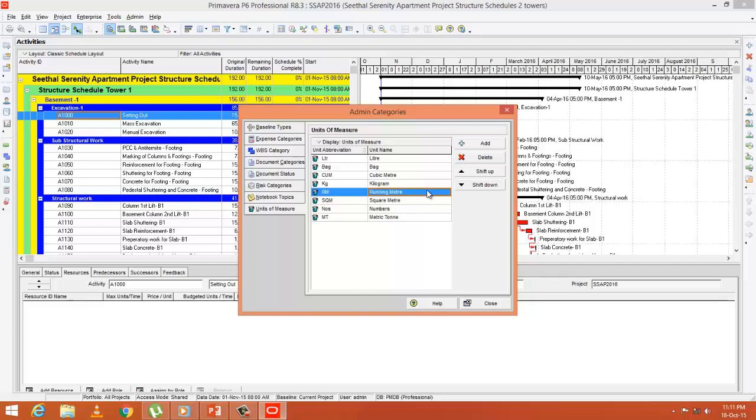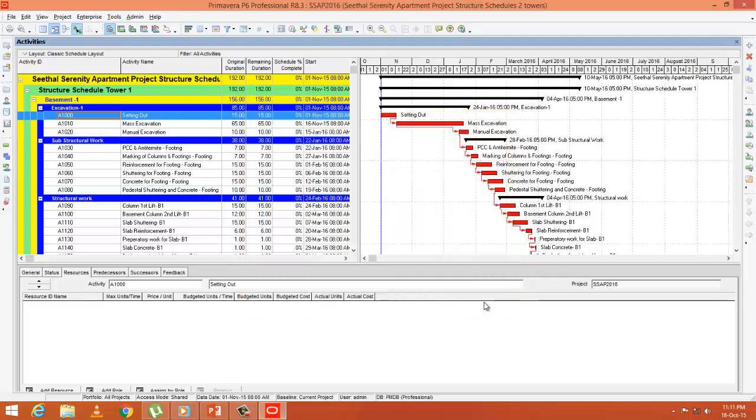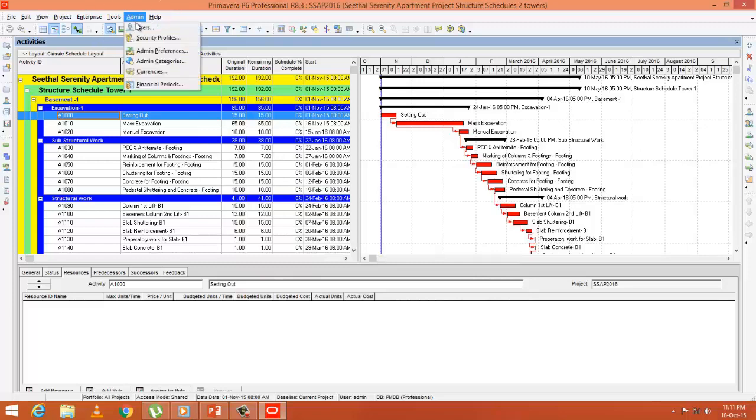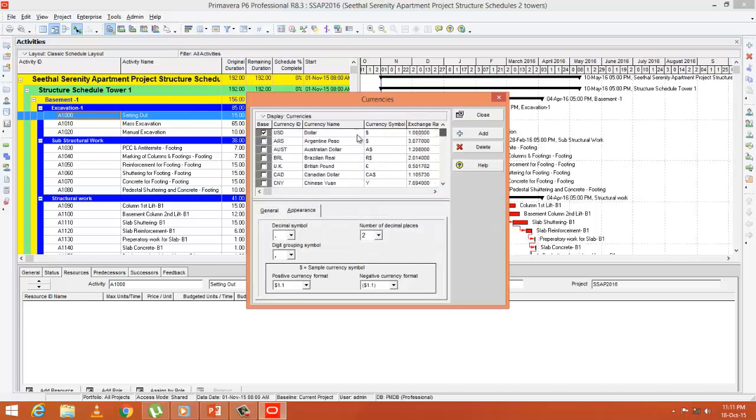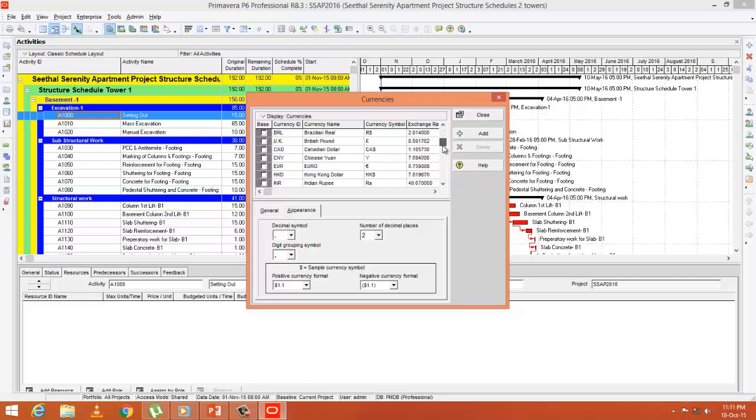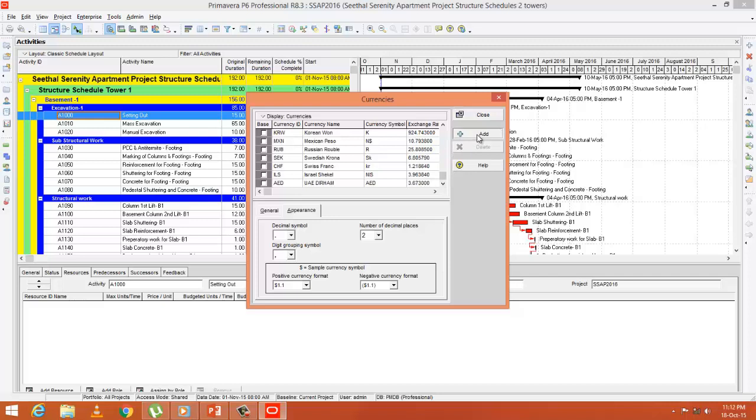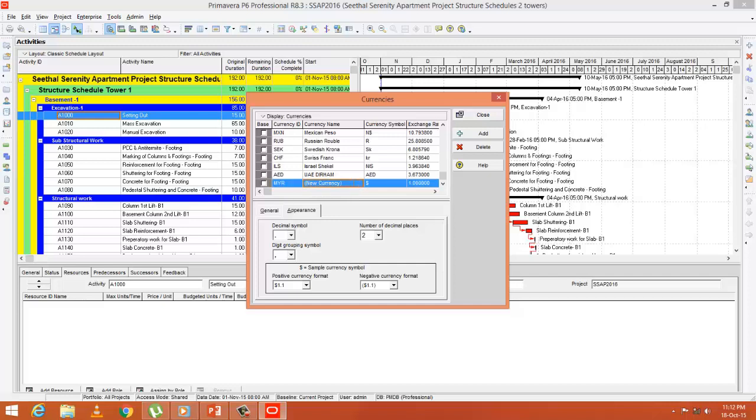Next is creating new currency. Go to Admin, Currencies. Here you can see dollar is the base currency and some default currencies are also displayed. If you want to add Malaysian ringgit, which is not displayed as a default currency, you can press Add. Currency ID: MYR, Currency Name: Malaysian Ringgit.